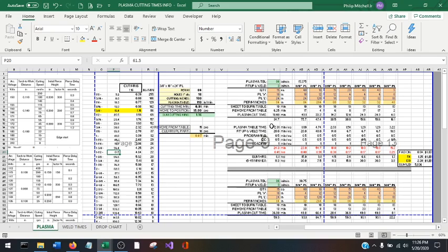And then here's basically the process. You get your stock sheet to the burn table. That's removing the scrap and the drop from the table. Here's your plasma cut time, again based on the chart over here. Okay, so this would be the before and after the plasma cut times, programming, loading. So anyway, I don't want to go into too much detail with this.